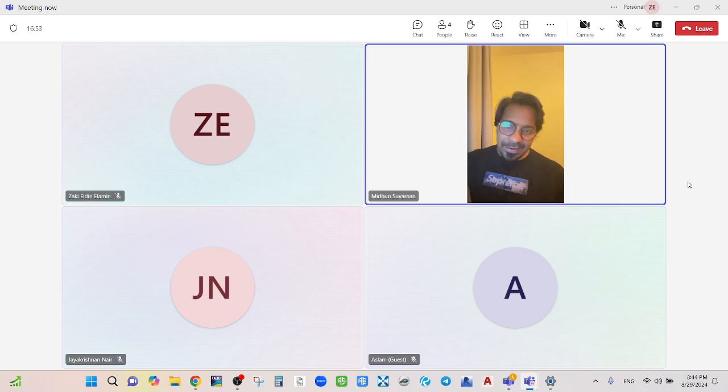Basically, you can define different types of guarantee. It could be a specific guarantee, continuing guarantee, conditional guarantee, or unconditional guarantee. A specific guarantee is what we see in our construction projects: the guarantee for a project is applicable only for that project. When you move to the next project, you have to have its own guarantee. A continuing guarantee is not applicable in our type of work, but applies when somebody is delivering a service for a long period of time: one transaction, second transaction, third transaction.